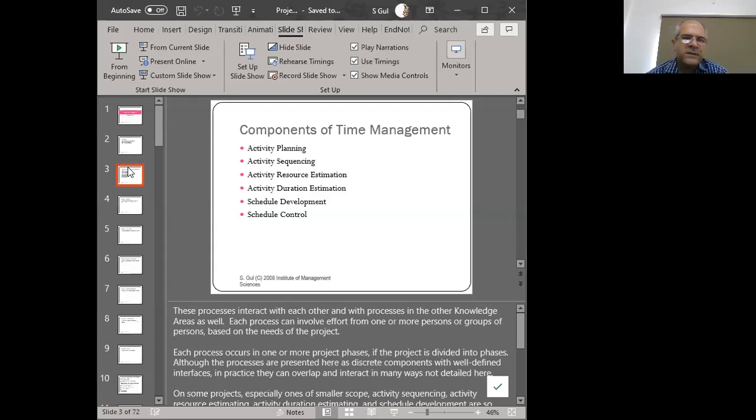The third thing that we have to do is think about resource estimation. So here we're thinking about how many individuals we require in order to perform the work for us, for example, right? For example, we can think about an activity, let's call it activity B, and let's suppose it is going to require 40 man hours to complete. So that means that one person is required in order to perform those 40 hours of work for us, because one person working full time does 40 hours of work in a given week's time period, considering that the person is working in a single shift type of environment.